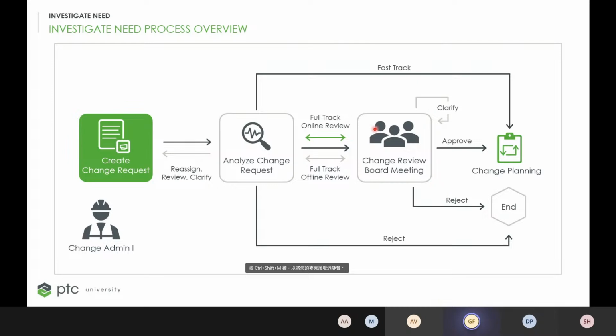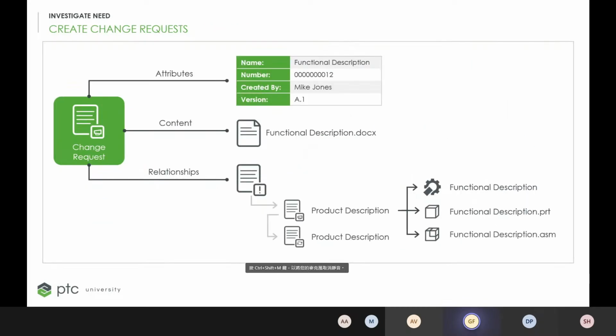And so it's a board meeting, which is headed by the CA1 himself. So this board committee will analyze this request again, and then they decide if they will approve it, reject it, or send it back for clarification. Okay, so it goes through a board that will decide together how to proceed. Maybe the costs are high, and then you require some more clarifications there.